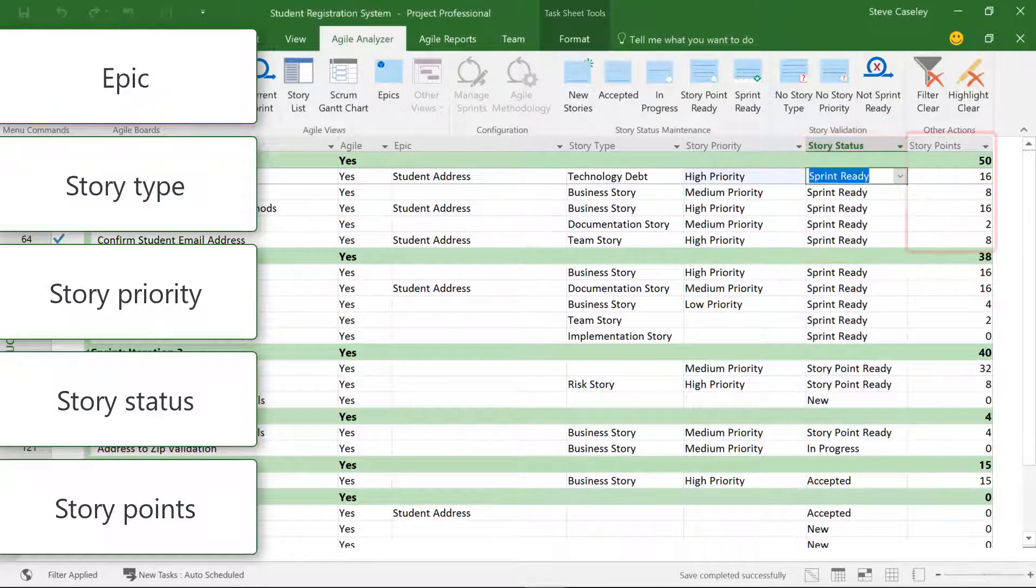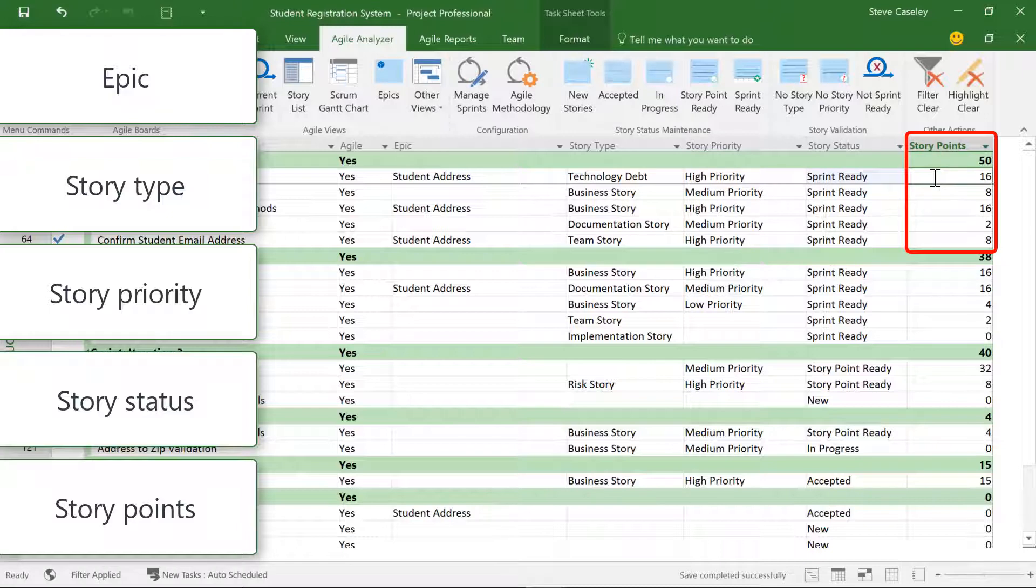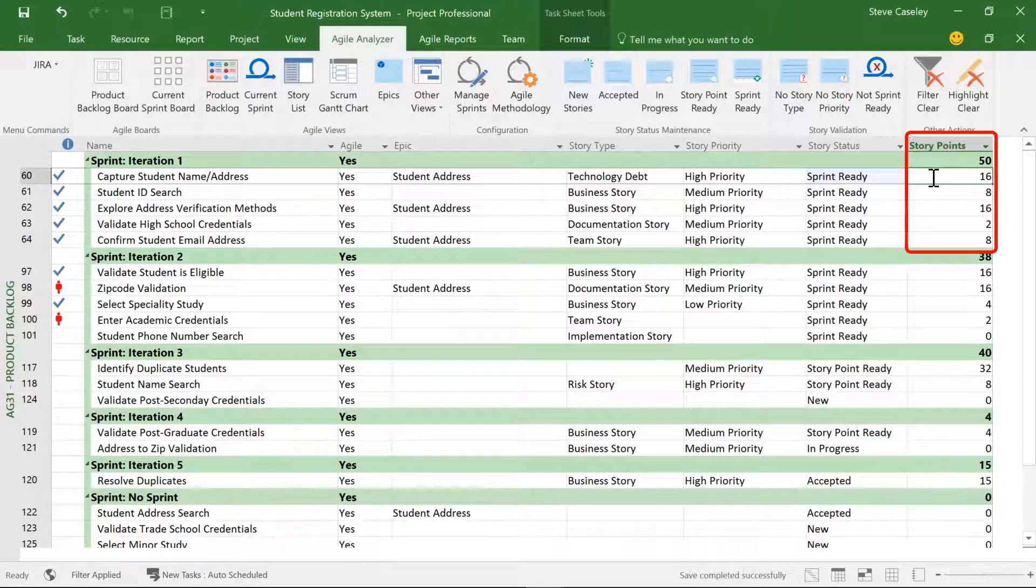This view is also very useful for reviewing and validating that the story point count for each iteration is within my team's velocity.